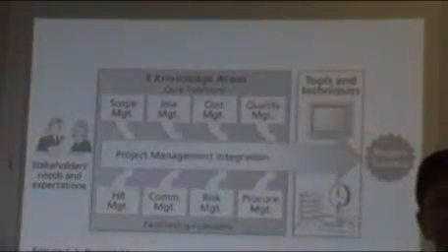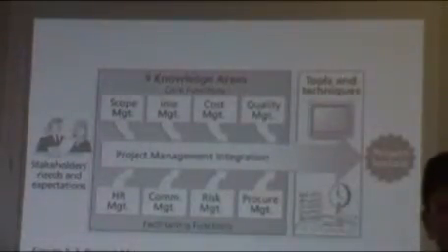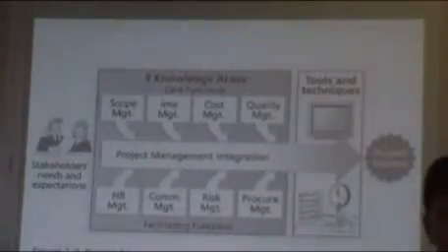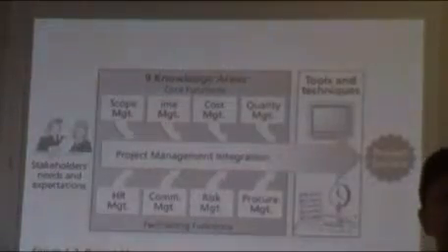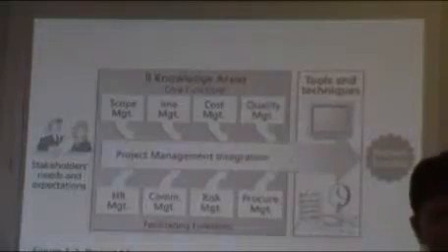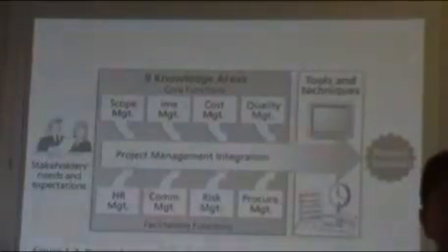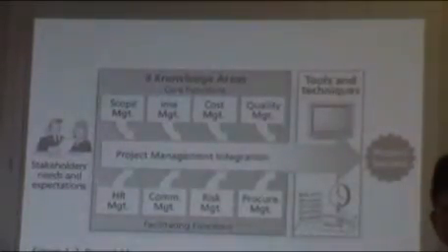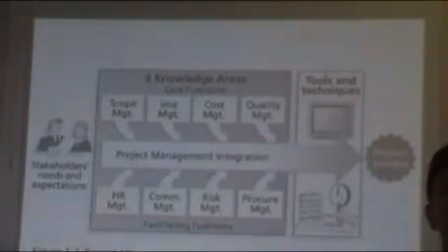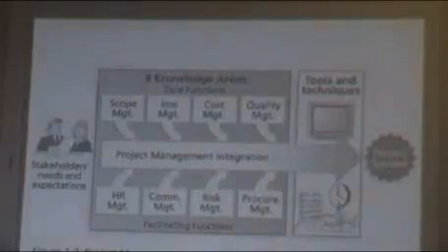And there needs to be a mutually agreed contractual document between the two parties. So procurement is to go out there, to identify a seller, to select a seller, and this will all be based on evaluation criteria, and then a procurement committee will approve it, and the outsourcing organization will then be contracted in to deliver the project.